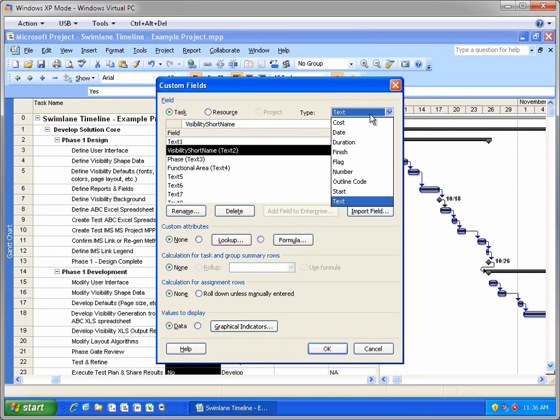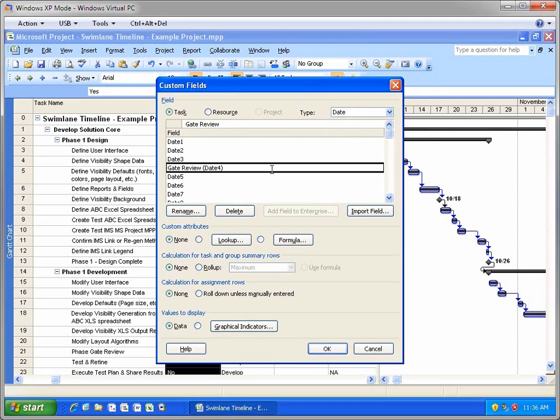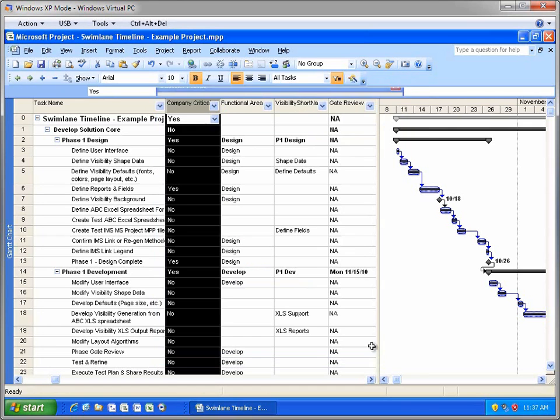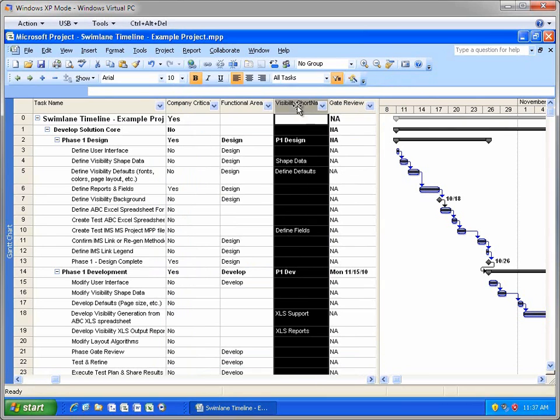The Swimlane Timeline also reads in custom task date fields. You can see that Date 4 has been renamed to be Gate Review, and a few of the project tasks have a Gate Review date associated with them. The Swimlane Timeline allows users to show date markers based on custom task date fields.